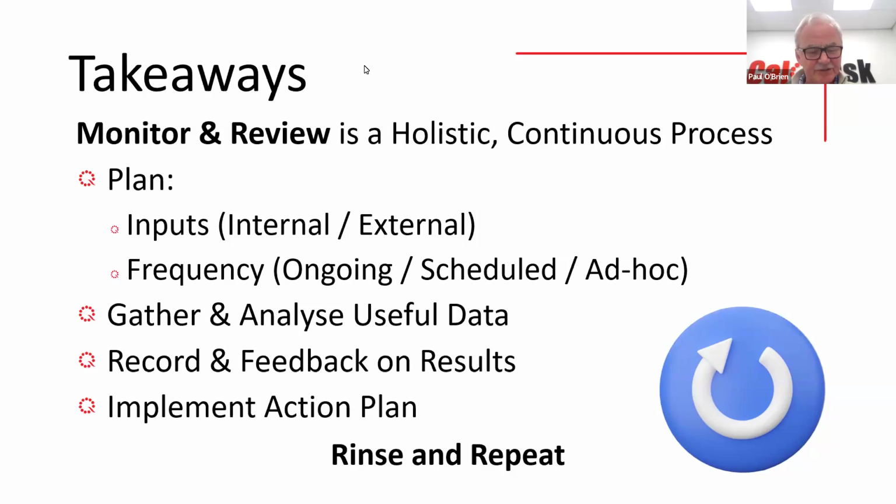It's like an audit schedule. Put it down and say, right, I'm going to do this. This is going to be done by the organization with some regularity. You can determine the frequency. Some of the risks that you'll have in your register are less important than others, and you can reflect that in a schedule. Do it on a monthly, quarterly, yearly, or 3-yearly basis, whatever it is.